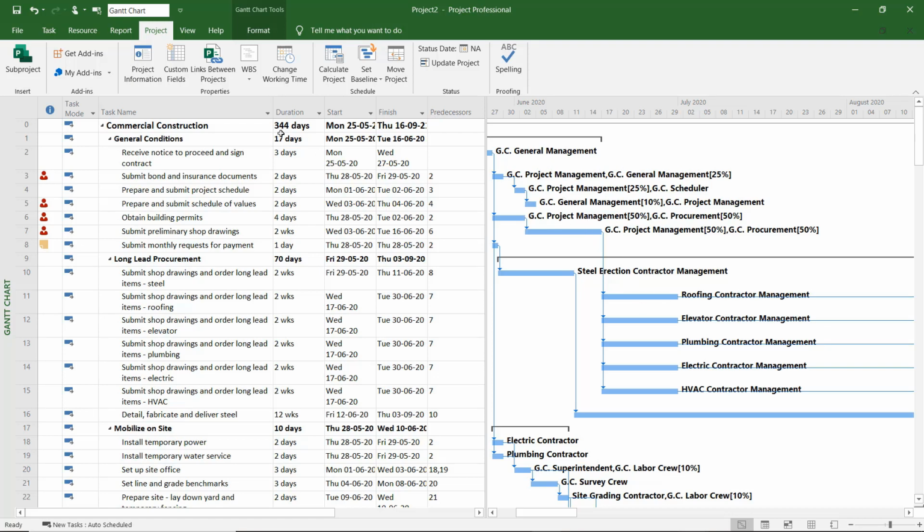There is a special type of duration called e-day or e-week. What does it mean? E-day or e-week or e-month. It means elapsed duration, because some tasks can be achieved during the working and non-working hours. If you want to accommodate for that, instead of using D for day, W for week, M for month, you can use ED for elapsed day, or EW for elapsed week, or EM for elapsed month.